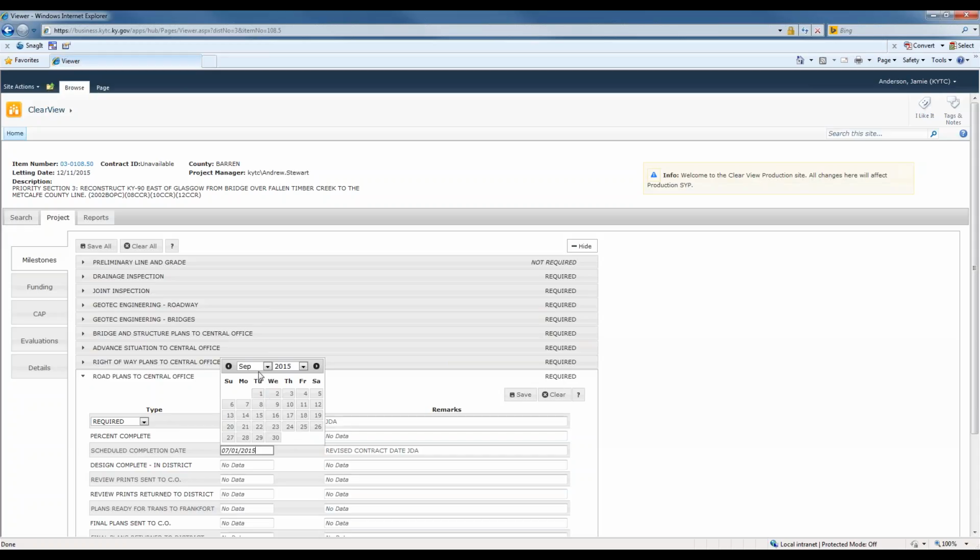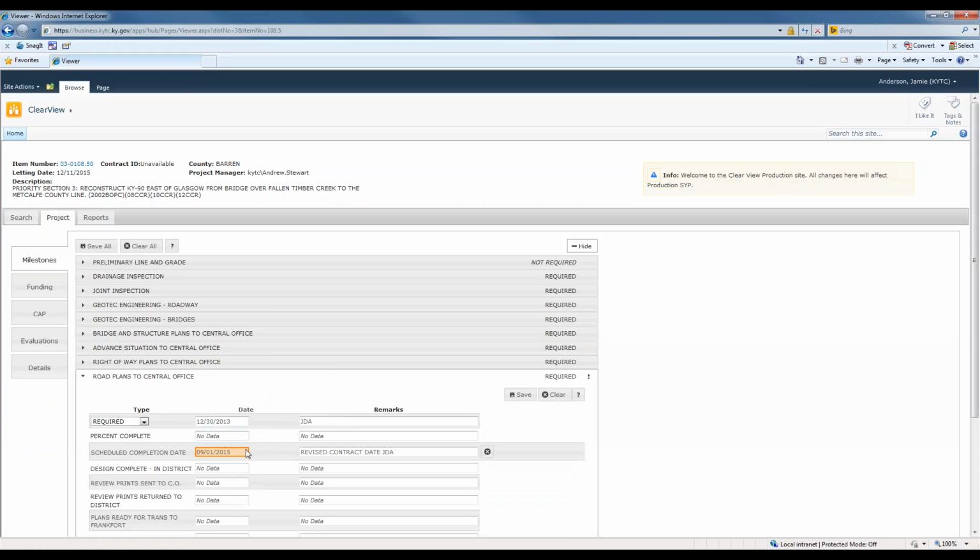So we go into the calendar, select the month, September, click on the date, and it's going to highlight this, which lets you know that a change has been made. You'll go over here and input a new remark. It won't let you save it until you enter a remark. So I have listed revised contract date. I'm going to put in today's date so that it knows the date it's been changed. You can click Save here, or if you're updating multiple milestones, you can click Save All.